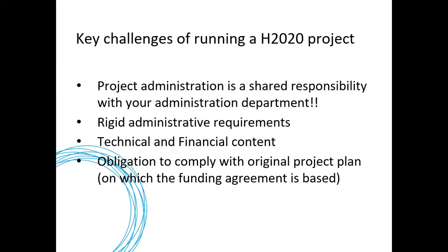This has to be provided by your financial unit, so you can then include this in your reporting. Of course, some researchers may find these administration requirements very rigid and cumbersome, but keep in mind that these are public funds which we are dealing with, so the budget spent in your project has to be accounted for. Moreover, the grant which was given to you is based on your project plan. So this has been proposed in your proposal, and you have to adhere to the plan which you have provided. For any changes to the grant agreement, you will have to do an amendment. But my colleague Lily will also be speaking about this later on in the presentation.